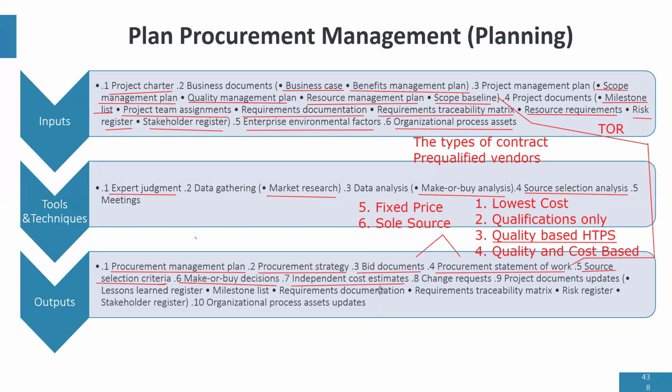Now, independent cost estimate does not mean that your team has not costed the work, but you just need a third opinion. Most times, independent cost estimates are used in negotiation, which means they're used in benchmarking and negotiation. If a company is bidding below the independent cost estimate, they are not going to get a contract, which means that bidding too low sometimes is a problem.